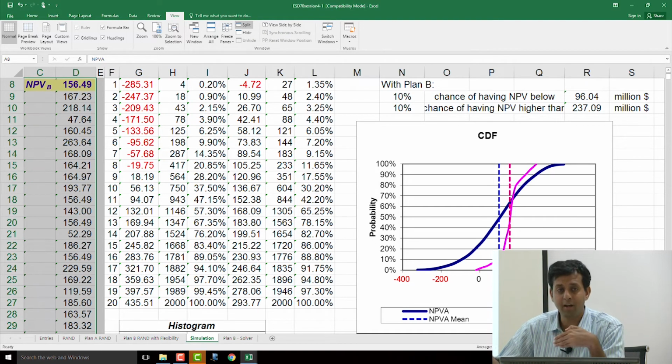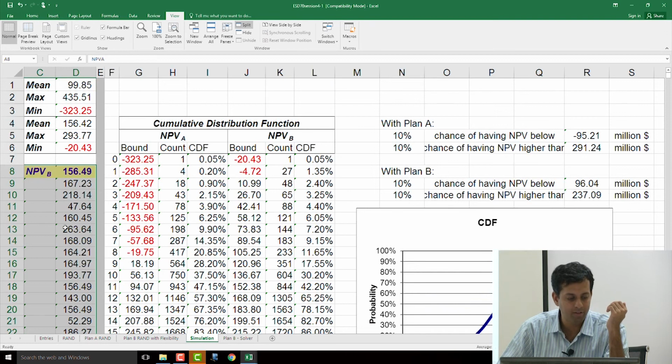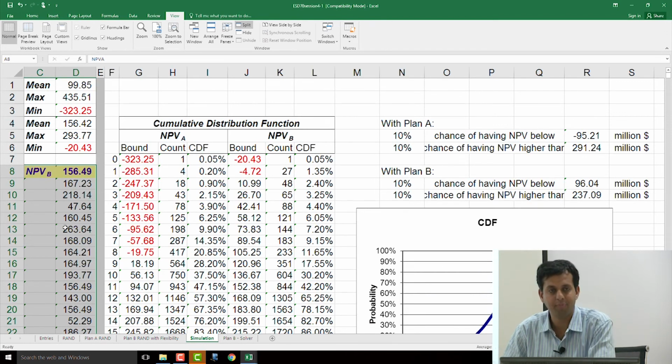In the first scenario, it was less than 300, then you would not invest. In the second scenario, when the demand was exactly 300, you might still not invest. Therefore you are minimizing your outlay, instead of committing yourself to 1, 2, 3. The whole point of flexibility is you can make a decision to invest or not invest. Plant A is not flexible. You're putting in the 900, demand is varying, and you get a mean NPV of about 100.